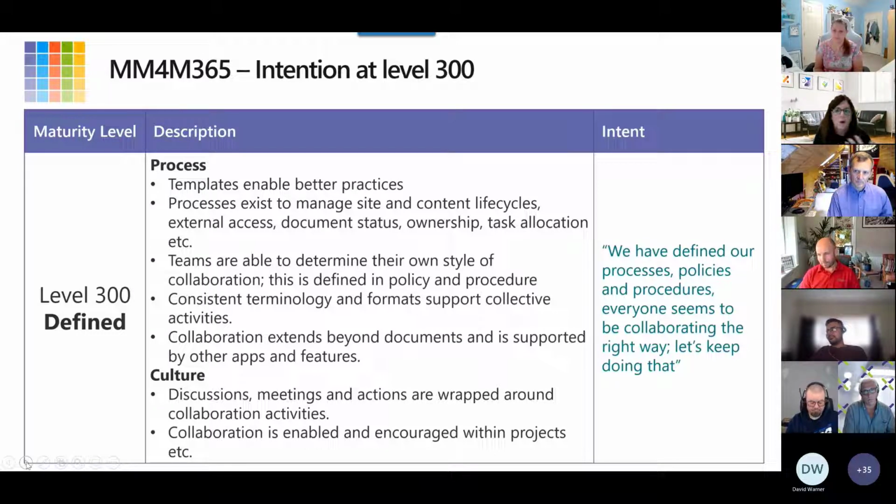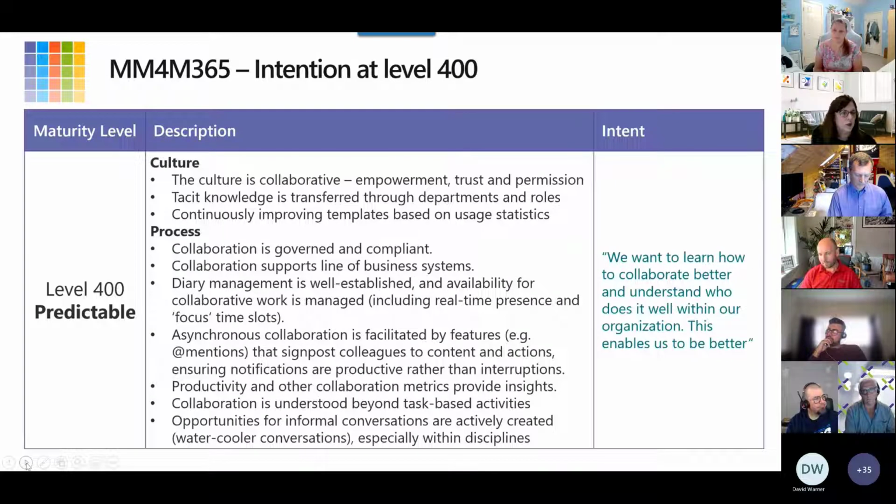clients, that part of the benefit of working with us is that you get the benefit of our entire organization. Our process includes a project closeout that takes our key assets and puts them in a place where they can be findable and more reusable. And so our process starts with what have we already learned, and it ends with let's make sure that our learnings are shareable. And I think that fundamentally, when that's fully baked in, that's where you're at a fully collaborative org. That's when you're the most mature.